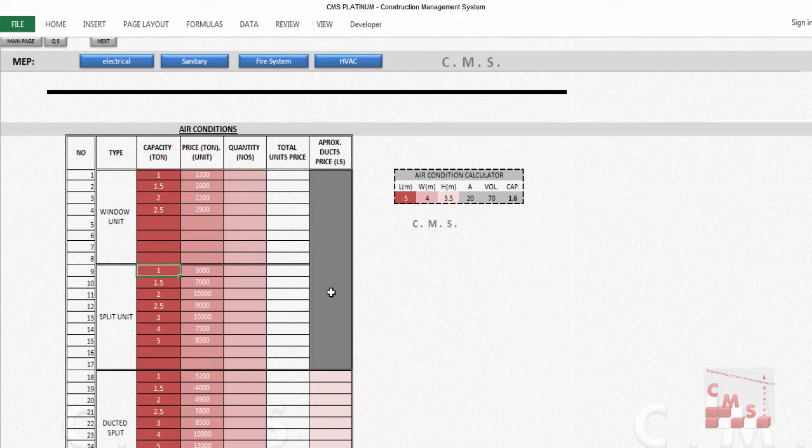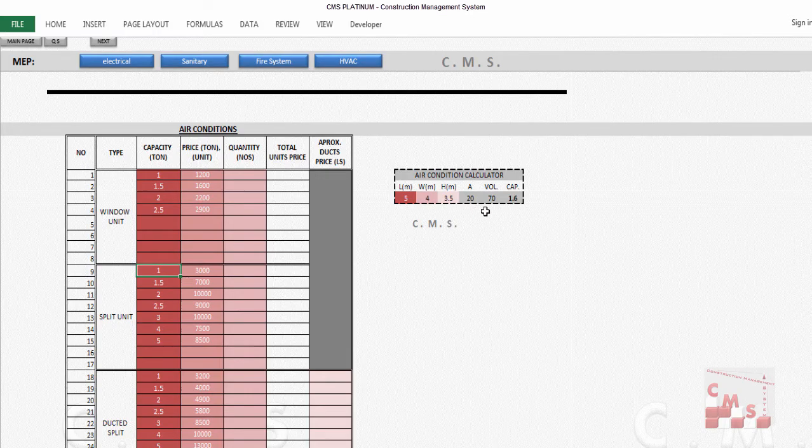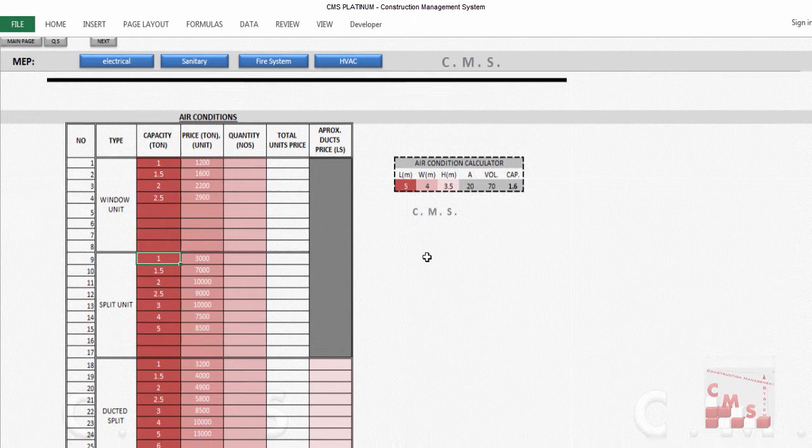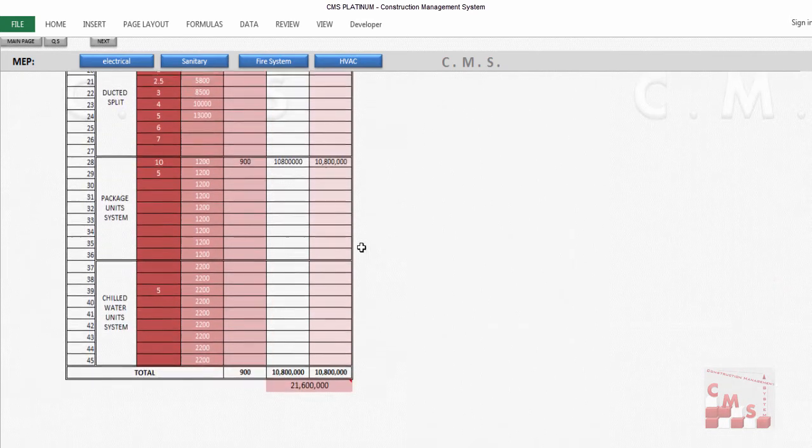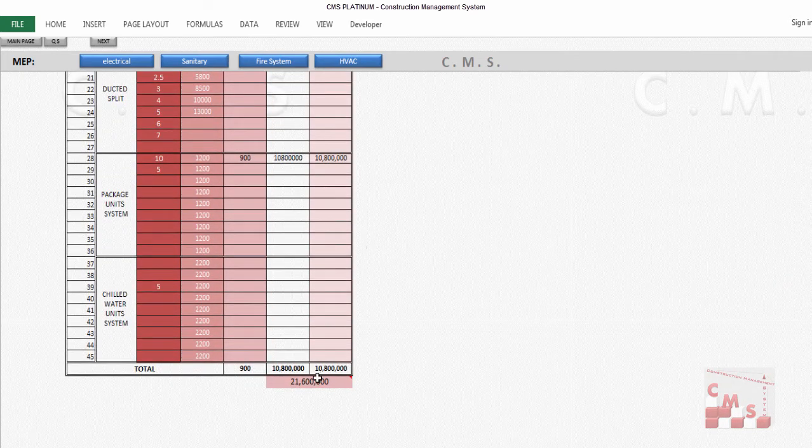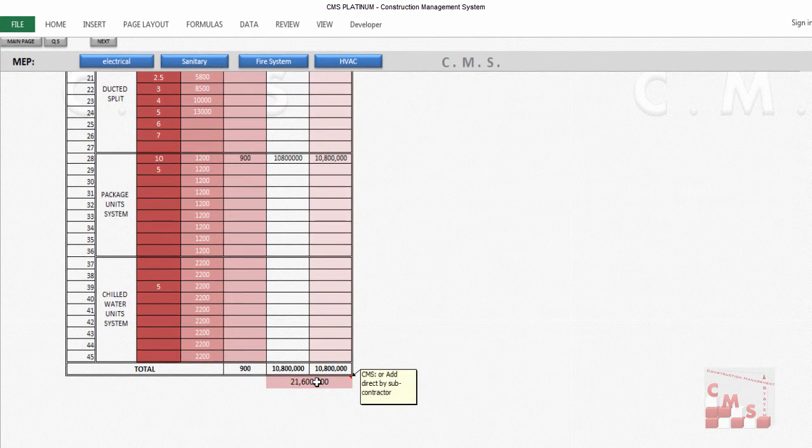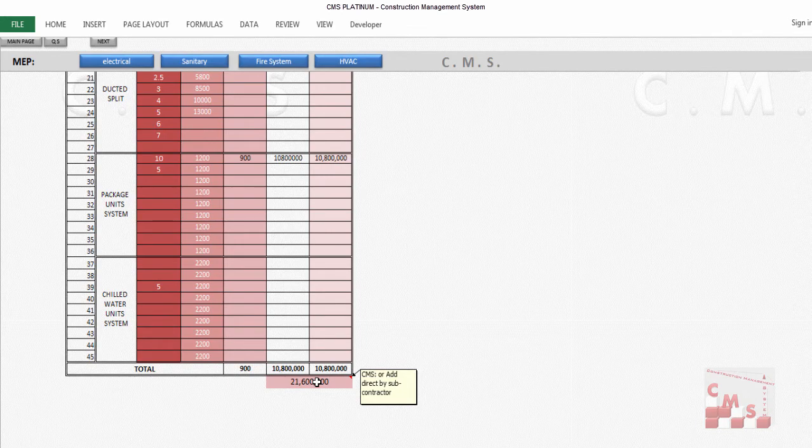Here we have an air conditioning calculator to know approximately how much capacity you need for each space. If you need to use it, you can use it for your information or reference. Or you will bring the price from a subcontractor and add it here directly, and CMS will consider it in the cost estimation.